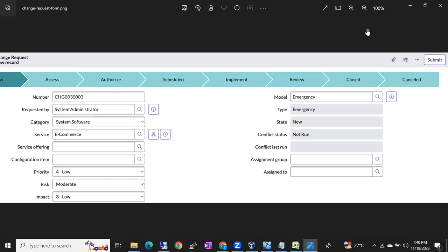Why do we have non-prod servers? Because we don't know how the new patch will behave on the production server. It might block some other things, right? So first we will patch it on the non-prod servers. We will wait for 1 week. In case of any negative impact, then we'll stop patching production servers. If it is good in the non-prod environment, then we'll proceed with the production servers. So the answer is yes. We have to patch the lower environment first if we have such kinds of environments.